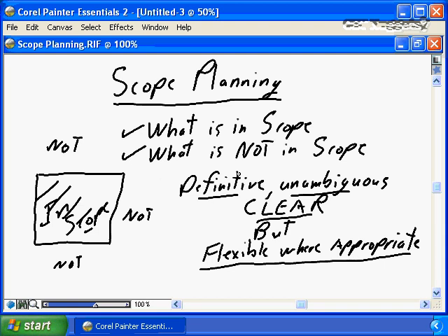You do not need to define early in the scope planning process the exact colors. You do not need to define the shade of blue, the shade of green, or even whether it is blue or green that is going into the master bedroom versus the second bedroom versus the third bedroom. So it's definitive, 3 coats of paint, it's unambiguous, it's paint, it's clear. Everybody understands what paint is. There is no doubt as to what the definition for the scope for the home is going to be,